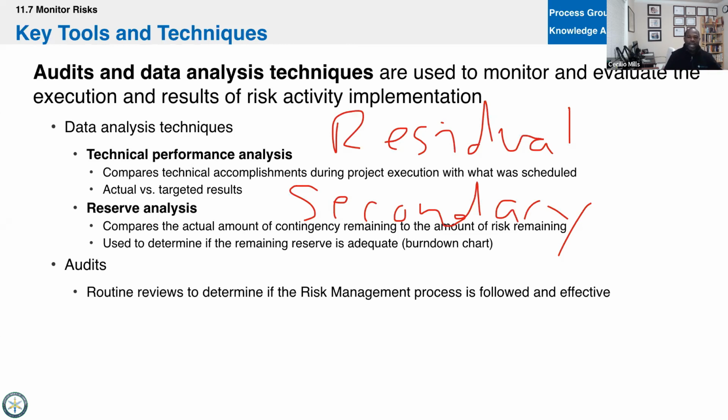A little bit of risk remained after that airbag deployed. And then secondary risk, some people get burned from the explosion that the airbag causes, right? So risk response, deploy airbag to keep your face from going. Secondary risk, you get burned from the airbag. Residual risk, you get a little bit of bruising from the seatbelt. Right, so that's the idea of residual and secondary risk.